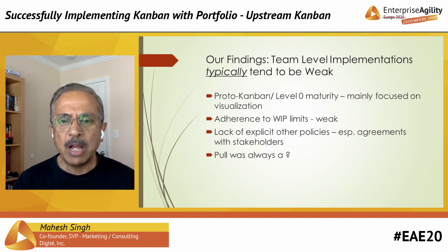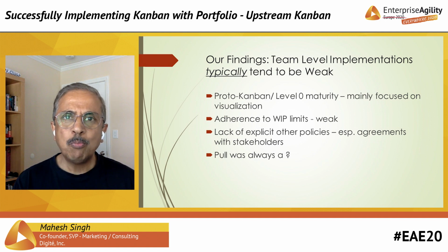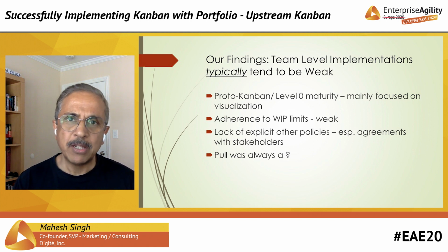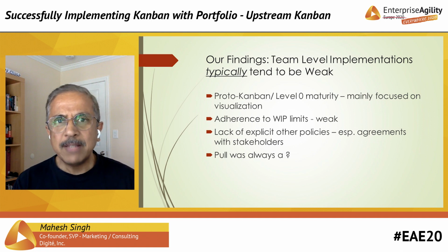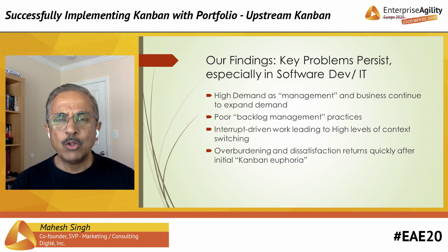And it is done maybe collaboratively. They may do it during a daily stand-up meeting or in a weekly replenishment meeting, etc. But pure pull, where a team member understands their capacity, understands that they have capacity to do work, and therefore pulls a card, that remains, in my experience, somewhat weak. So let's take a closer look at that.